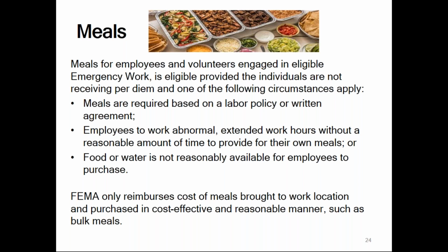Meals, as I've mentioned before, can be eligible costs. I know a lot of the emergency operations centers have a lot of people working in them right now. Meals for those employees and volunteers engaged in eligible emergency work can be eligible, provided these individuals are not receiving a per diem and one of the following circumstances apply. These meals must be required based on your own labor policy or your own written agreement that you have currently in place, or the employees are working abnormal extended work hours without a reasonable amount of time to provide for their own meals, or this food or water is not reasonably available for the employees to purchase.